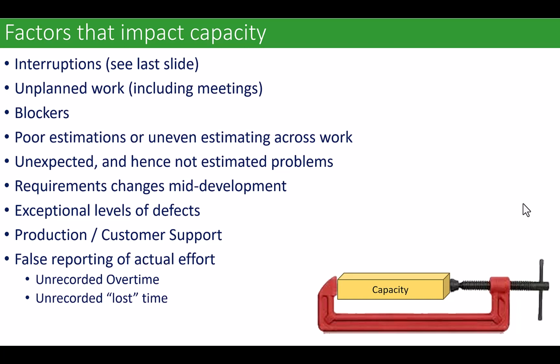So the business needs to take a certain amount of accountability for thinking far enough ahead that they at least won't interrupt the current planning interval, whatever it is. Sometimes it's as granular as a sprint, which is almost too granular, and sometimes it's the grand 5-year plan, and that's way too coarse. So somewhere in the middle, or to the left of the middle, is probably the happy place. 2 months, 3 months. But just understand that planning is an interruption that, while a necessity, reduces capacity.